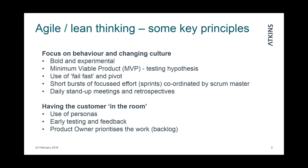Using this approach on one project allowed us to identify that whilst we were doing some good work, we were traveling in a direction that wasn't the most productive and useful. Within just three days, we were able to learn that we needed to pivot or change direction, identify what the new plan needed to look like, and switch across to a different set of outcomes and deliverables. This is something which, through a more traditional approach, might have taken us weeks to identify. One of the benefits of agile is around bringing people together with real close and frequent communication, keeping each other informed about what we're doing, testing against requirements and the customer's need — and that's proven to be very powerful for us.